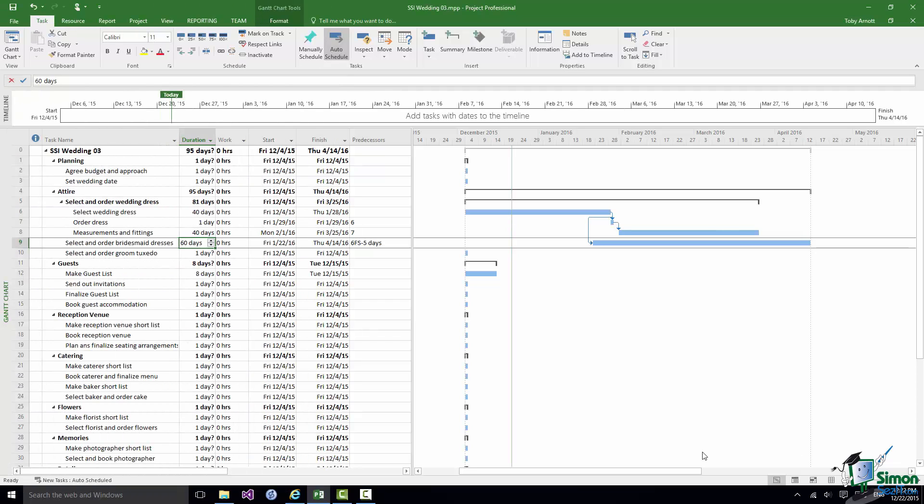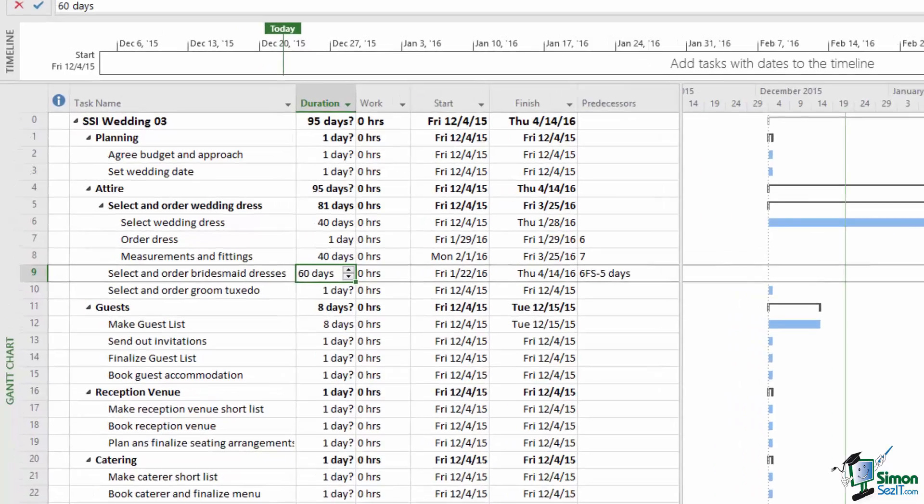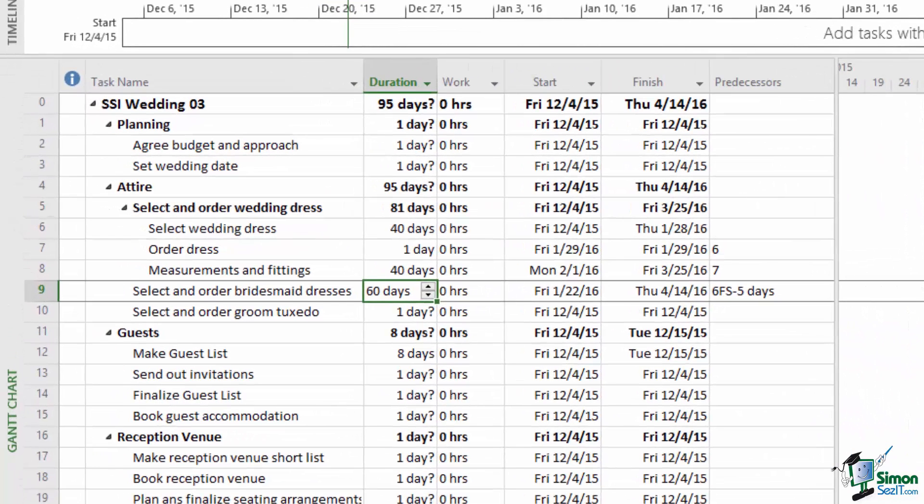Now I'm going to restore that to being a lag of zero days in a moment. But first of all I'd like you to look at the Predecessors column. If you look at Task 7, Ordered Dress, its predecessor was six. Look at Task 8, its predecessor was seven. Where all you see in the Predecessor column is a number that indicates a default Finish to Start relationship with zero lag.